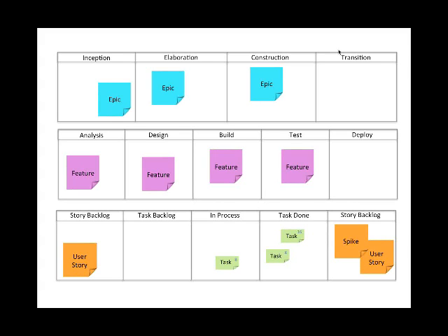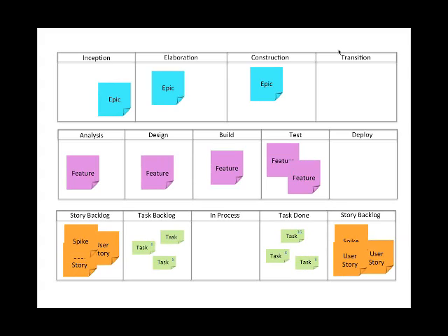And kind of the metaphor here at the team level is, if I have developers and testers in an Agile team, and the testers are constrained, it's very common for the developers to want to keep writing code that can't be tested by the QA team. And so in Scrum, we enforce that by this definition of done, done. Well, what we're saying now is that at the higher levels, at the feature and epic levels, if a feature is blocked because of the performance of one team rather than an individual or a role, now what we have is a condition where that team is the bottleneck, and what we have to do is to either subordinate, elevate, or exploit that particular constraint.